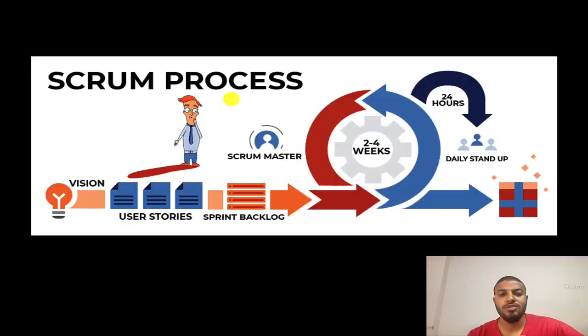The most popular methodology in Agile projects is called Scrum. Most Agile teams apply Scrum, so I will give you also a brief introduction to Scrum. Scrum divides the big project into small iterations, and we call them sprints. Each sprint is from 1 week to 4 weeks. At the beginning, we have a vision of what we are going to develop, let's say a social media platform, and we begin to write something called the product backlog. It is a replacement for the SRS or the BRD. It includes requirements in the form of user stories. We will discuss them later.